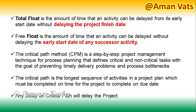Total float is the amount of time that an activity can be delayed from its early start date without delaying the project finish date. Free float is the amount of time that an activity can be delayed without delaying the early start date of any successor activity. People often get confused between these two terms — the key difference is that total float relates to the project finish date, while free float relates to the early start of the next activity.